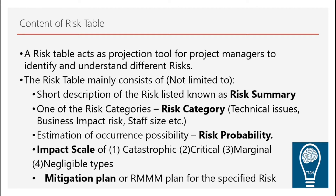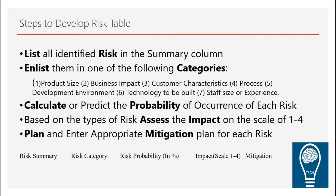How do you develop the risk table? First, list all identified risks — summarize them and list them into different categories. There are seven categories: product size, which is the size of the product and amount of work to be done; business impact, when the project directly impacts the whole business — a very high level of risk; and customer characteristics, where requirements are changing and customers may not understand how systems are developed.